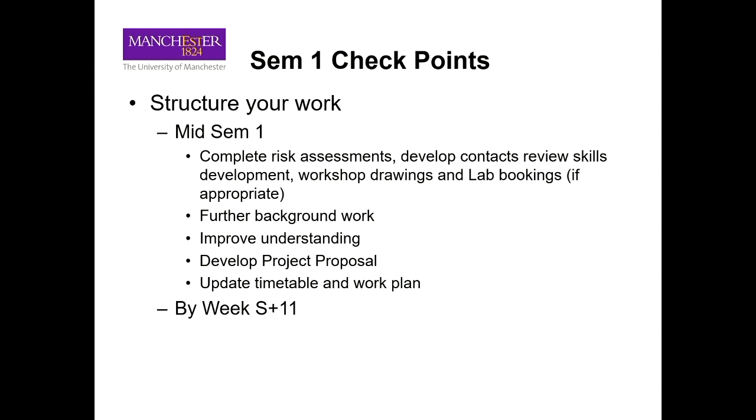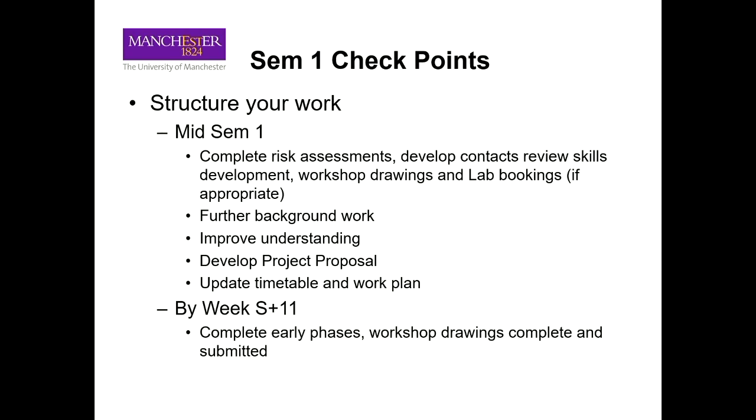So semester one, week 11, okay, you need to know anything that you need to order, right, for experimental projects, anything that you need to order or something that you need to be made, you need to have submitted the order or submitted the request to machine by week 11, semester one. Okay, there's a backlog. You can see we have many projects, okay? So there's a backlog to make things, to buy things.